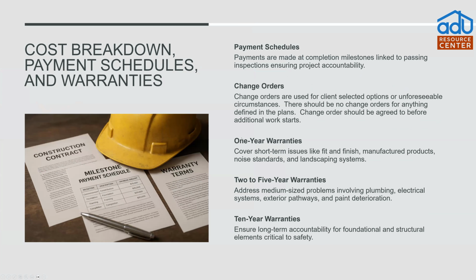All right. Now we have payment schedules, change orders, and warranties. Payment schedules are really important. The contract will clearly define exactly what's due and when. Just like the milestone checkpoints, at the completion of a milestone is when payment becomes due. It'll be clearly defined, laid out in the contract. You'll know exactly when it happens, and it'll be signed off by the inspector before that next payment's due.